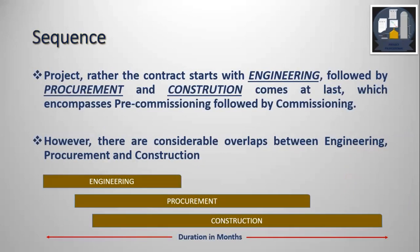Now we will see the sequence of EPC. The project starts with Engineering, followed by Procurement, and concludes at Construction. Construction includes Pre-Commissioning, Commissioning Startup, Performance, and then Performance Acceptance Test follows.